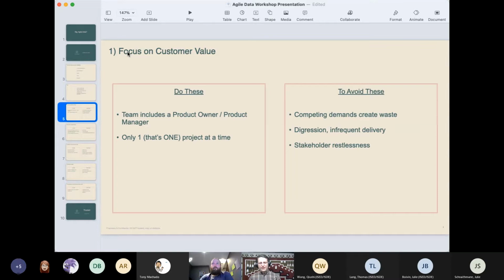So you don't want a developer or an engineer or an SME or a data scientist to be trying to juggle 3 projects at once. It's not going to work. Or it'll just work super slowly and expensively, and you'll see massive delays. It's much more effective to force product to make a decision on which one of these is more valuable. If you could have one thing today, what's that one thing going to be? Okay, that's what we're going to do first. And when we get that done, we're going to go on to the next thing.